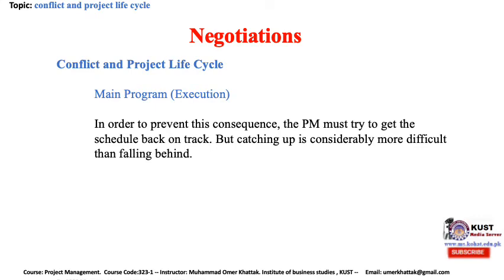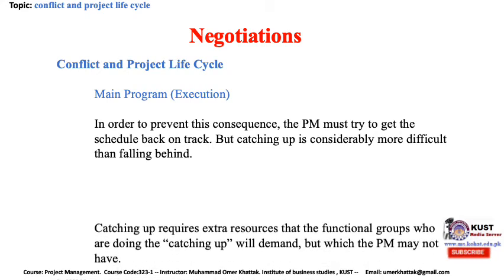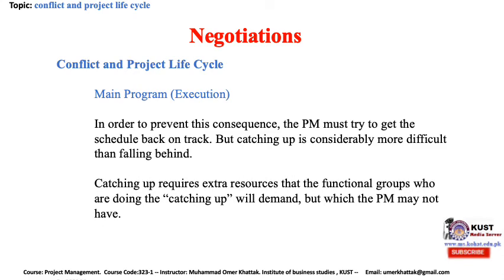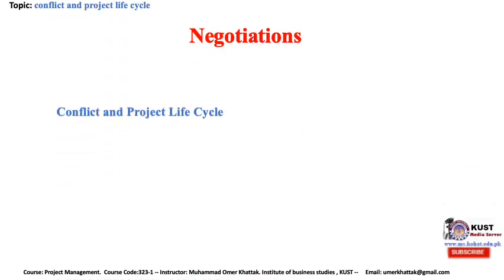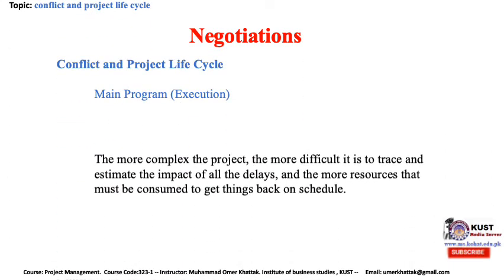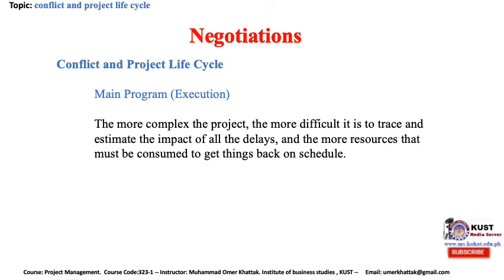But catching up is considerably more difficult than falling behind. Catching up requires extra resources that the functional groups who are doing the catching up will demand, but which the project manager may not have. The more complex the project, the more difficult it is to trace and estimate the impact of all the delays, and the more resources that must be consumed to get things back on schedule.